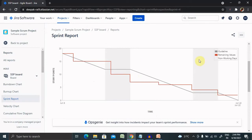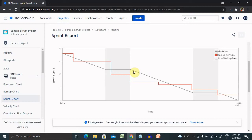The gray line ceases during non-working days. The red line represents actual work done during the sprint. It's drawn from the total estimates of issues at the start of the sprint and it goes higher or lower as the team works on issues in the sprint.